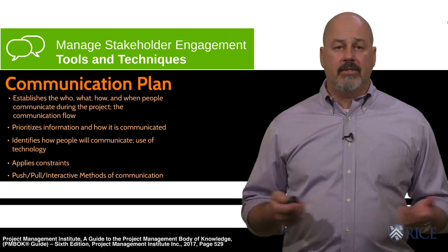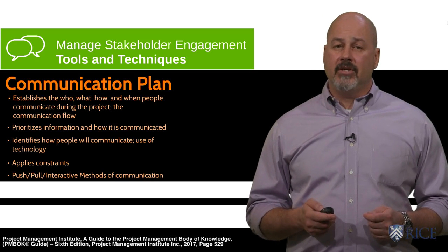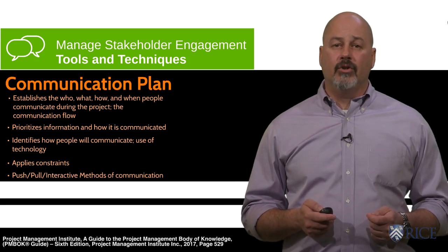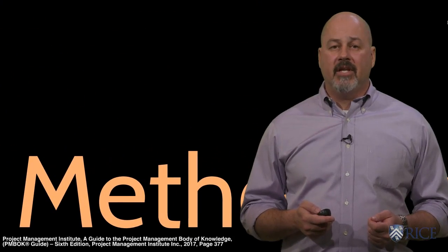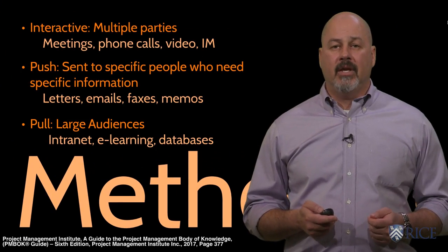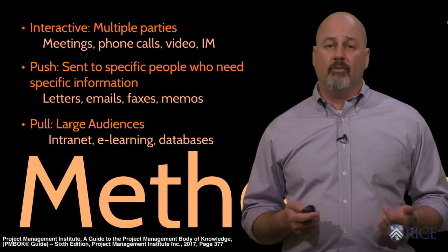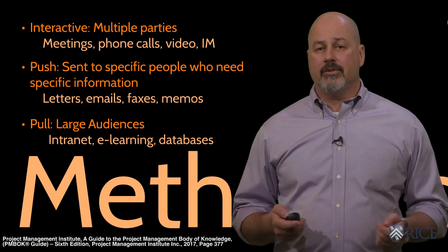For some people, it's a phone call. For others, it's email or Skype. And lastly, it should indicate whether you use a push or a pull method for each person. Keep in mind, this is an interactive part of the project management plan and will include lots of people, and you should identify the types of push or pull communications that are determined most appropriate for each situation or person.